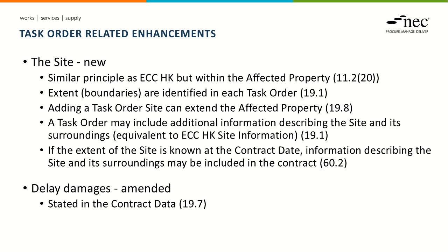So the idea here with the changes around task orders is to allow the client to use task orders as a way of calling off work and effectively doing a number of mini projects through the term of the contract. So this is sort of using the contract in a slightly different way. Rather than providing the service over a term, this is to allow a client to do mini construction projects through the use of the task order provisions.